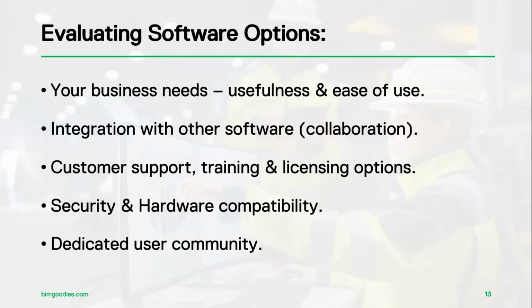Because sometimes you find that you are running maybe your business, and in terms of access to work, you may not always have work every month or work every week that needs to use this software, for example. So like if you are doing quantity takeoff, although the project may run for maybe 2 years, where there are other contract phases where there are tasks that you are doing during the contract phase. But if the software could be only for doing the pre-contract phase, then it means when you are done with the pre-contract phase, the software stops being useful. So in terms of licensing, are they going to still charge you even for the time when you are not using the software? Those are some of the considerations you should make.